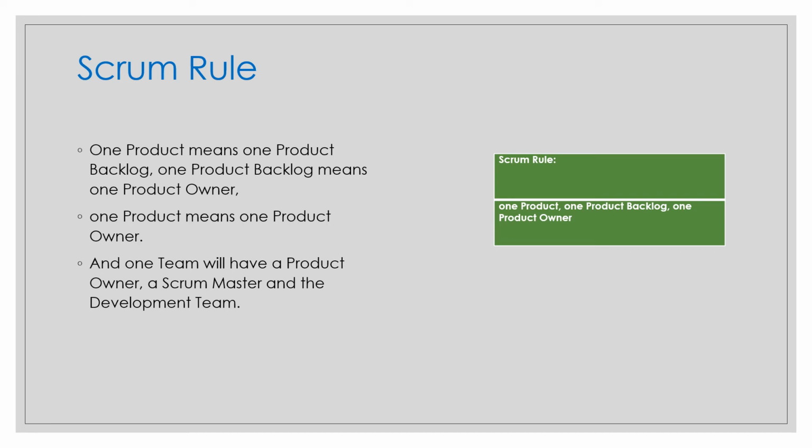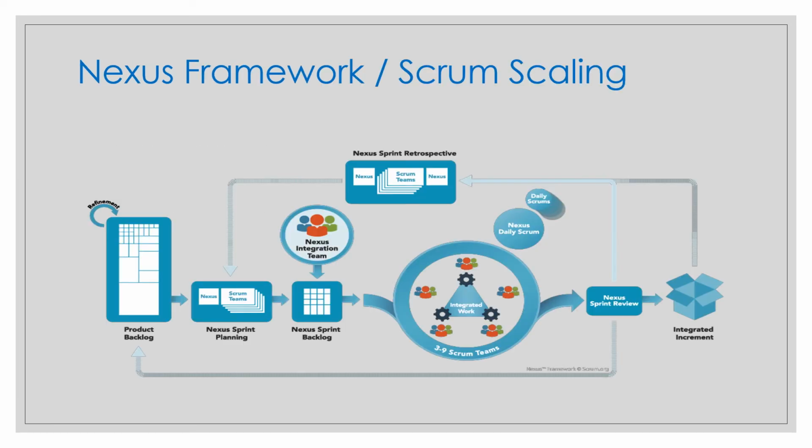as long as it does not conflict with the common definition of done defined for all the teams. So when multiple teams work on the same product, the sprints are not necessarily aligned, but at the end of each sprint of a development team, the product increment must be integrated and the same DoD will apply. Sprint lengths may be aligned, meaning they start and end at the same time with the same length, but Scrum does not have a requirement to state this.